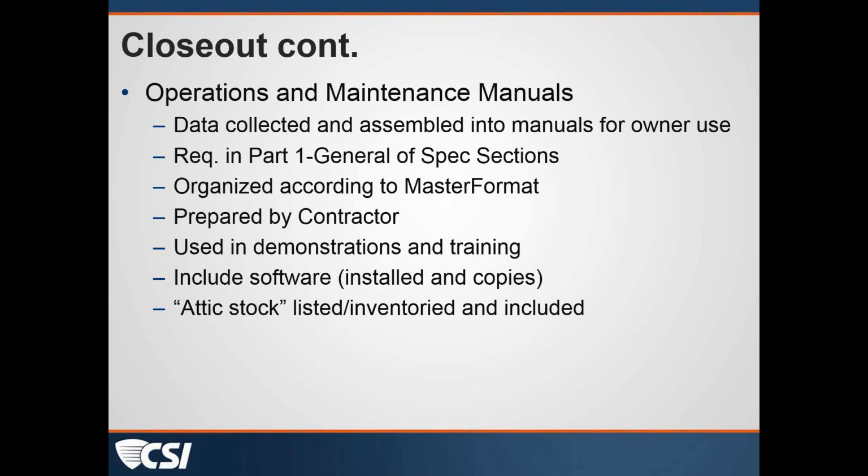Tying payment to submittals is allowable. That one might be a little bit tougher. You might need to make sure you've got a good submittal schedule with some firm dates, or tied it into the pay app with a cost loaded schedule type situation. But yes, you can make those periodic monthly payments conditioned on some other events happening.